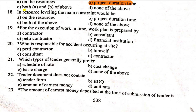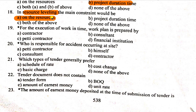Now let's look at resources leveling. In resources leveling, the time is not fixed but the resources are fixed. So in resources leveling, the main constraint would be on the resources — these resources are fixed.